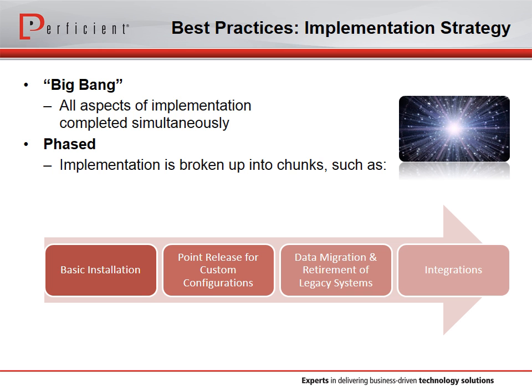This strategy allows your core business or your critical business needs to be addressed in the initial phase very, very quickly, and then requirements to be refined at the beginning of each subsequent phase based on the input from experienced users of the system. Also, this allows for a stable CTMS system from which to build integrations in a phase 2 or subsequent phase scenario.